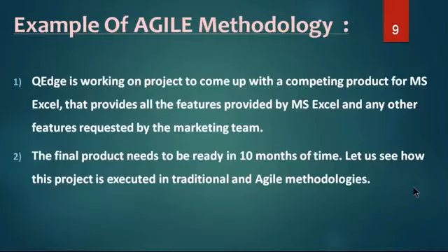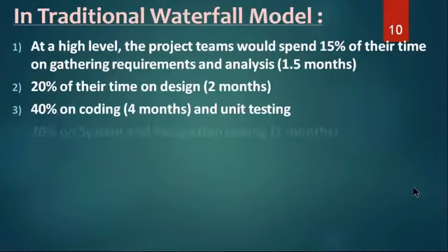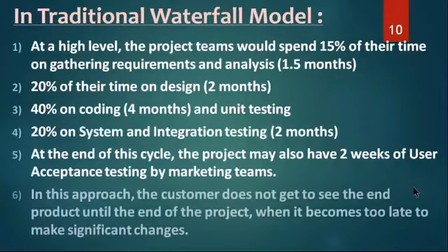If I take SDLC, look at that. Suppose I'm developing by using SDLC, assume that. At a high level, the project team would spend 15% of their time on gathering requirements and analysis, like 1.5 months. Going to the customer, sitting with the customer, gathering his business requirements, understanding his business requirements, developing the SRS, right? A lot of things. 1.5 months they'll take. Again, 20% of the time will be spent on designing. Again, you are taking 2 months for that.